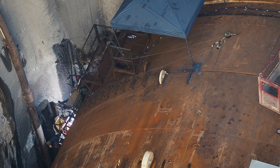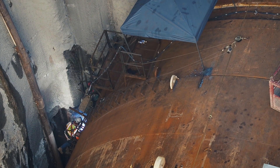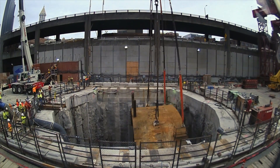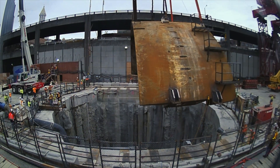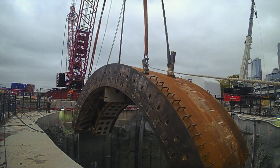There's also a very extensive welding process. When we removed those three front shield pieces, we had to cut them out of the front shield, and now that we've reinstalled those, we need to re-weld all of those front shield pieces in place. We've talked about the reinforcing steel plates — we still have some welding to do on those as well.